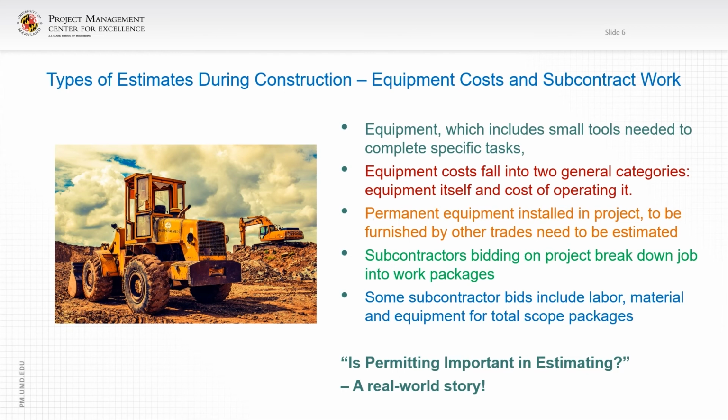You could split up a building, for example, into foundation to grade as one permit if the building department will permit it, and then get a second permit from grade to top out. However, you need to orchestrate that very carefully, because if you get a permit from foundation to grade and then there's a delay in getting the second permit, what do you do with the workforce? Do you stop work? Do you demobilize and come back? Very disruptive and very costly. So if you split a building up into two permits, be real careful that you synchronize the timing very carefully.